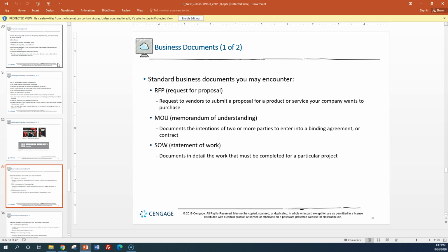So you're also going to run into some of these. And if you're in my project management class, some of these are going to look familiar. You're going to see this term, a request for proposal. So the college needs another 100 cameras on campus or whatever number they decide. They would create a request for proposal and send that out to vendors to try to get contracts and pricing for it. So it's a way that we can do competitive bids.